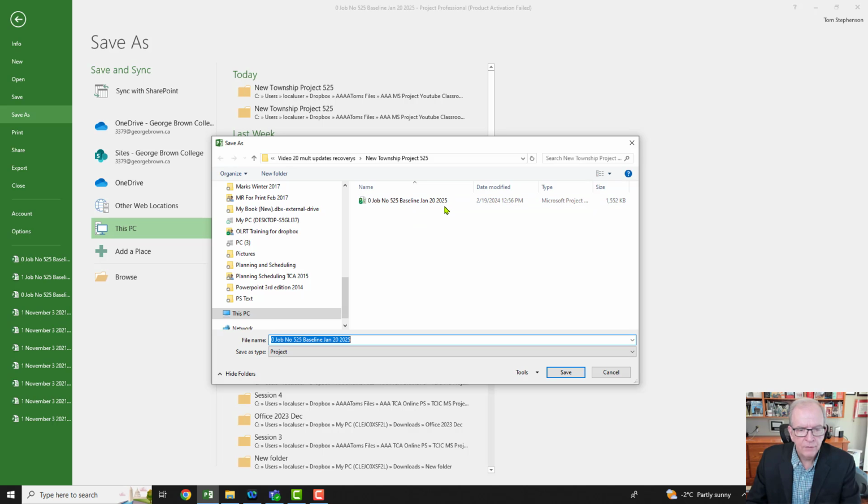And I talk about having standard operating procedures with my students. So this is kind of like a file naming protocol that if you follow it, then you'll have a listing of where your project was at specific moments in time, which would be your update dates, the dates that you update the project to. And you can understand if your project is like 14 months long, well then the 0 is the baseline.